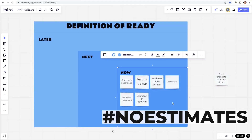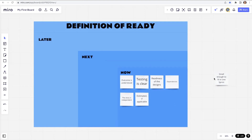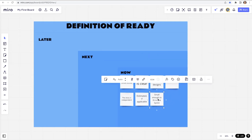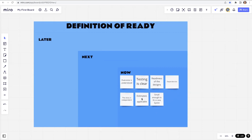If you want to know more about story points and estimating, watch my 'Don't Sweat Estimations' video and also 'How to Estimate in Story Points.' If you don't estimate because you are in the no-estimates movement, you might want to find a way of labeling your stories as ready in your backlog. And last but not least: small enough to fit in one sprint. This might mean splitting it into smaller pieces or recognizing the story is actually an epic. Stories should fit within sprints so we have something releasable by the end.